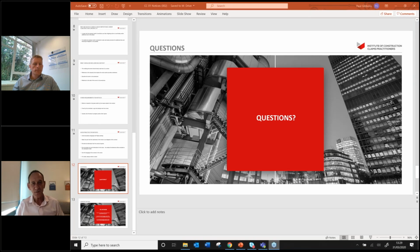But as we said earlier in the presentation, if you think it might qualify as a force majeure event, submit a notice anyway. One thing I didn't mention about the notices is that if you submit a notice, there's nothing wrong with you then going back and saying, look, we've investigated this further. It wasn't as bad as we thought it was. The events that were being delayed weren't on the critical path. We won't be pursuing a claim. So in effect, you can't withdraw the notice, but you're telling the other side that, okay, we've looked at it and it wasn't an effect, we won't be putting a claim in.